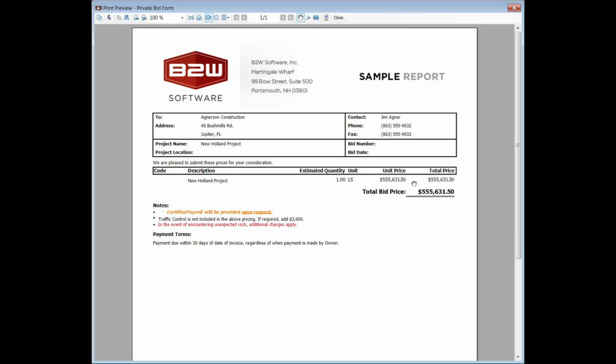But this is, again, one of the strengths of work breakdown structure, is if you have that kind of flexible need where, yeah, I might have to give them a lump sum, but then I might also need to break it out to other levels. In WBS, you can just say, go further down the chain and break out the different components underneath. Now, if I were in a pay item-based bid, I would have to re-engineer all the pay items around the new things that I wanted to price.